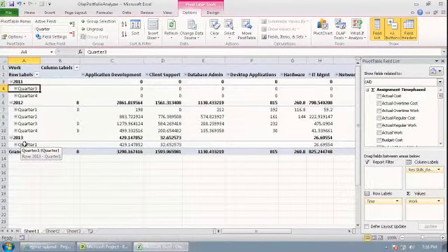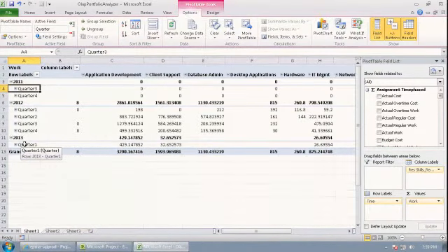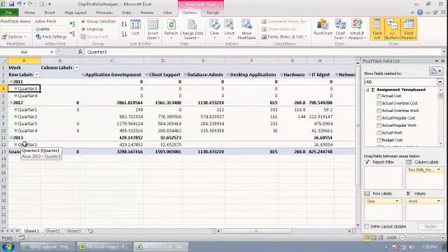A filter, basically, just like in Excel, or if maybe you've used filters in Microsoft Project, allows you to take a bunch of information and filter it down to only show you the specific types of information that you are interested in. And it hides all the other information. So in my demand portion of the report, I don't want to see all of the assigned work because this report right now is representing work assigned to generic and non-generic or real people resources. Okay, I only want to see generics. So I'm going to filter this information to only show generic work.